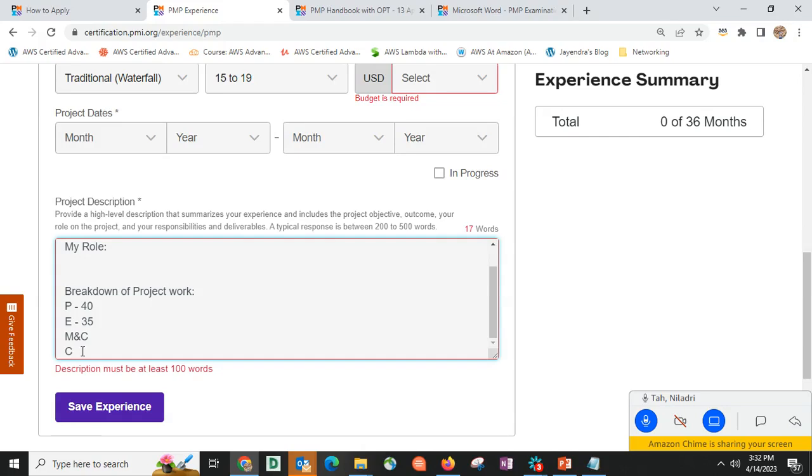You did the UAT and everything in the monitoring control, and the lessons learned and all that stuff will be done in the closing. Now we are going to again deep dive into each of these process groups. As of today, we have only deep dived into initiating, but planning is something where you are going to make the project plan in terms of scope, cost, time. The schedule has to be calculated, the cost has to be calculated, the budget has to be done, even the buffer of the budget has to be done. Then again, your baselines has to be defined, and more than that, your planning for the quality has to be done, your risk management has to be started and all that stuff. So risk management starts off in the project charter itself, but what I'm trying to say, your risk register build up, that all happens in planning phase.